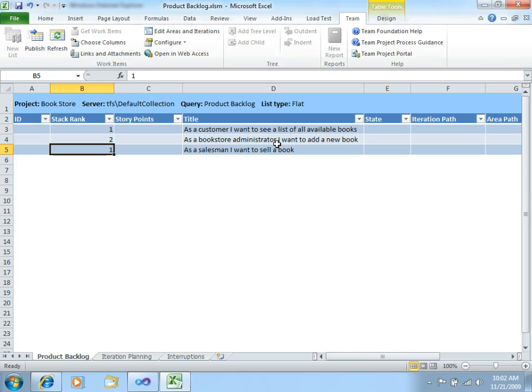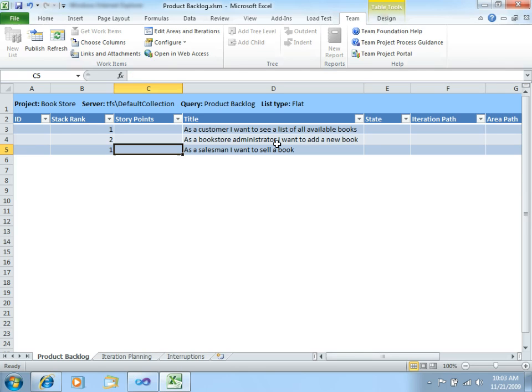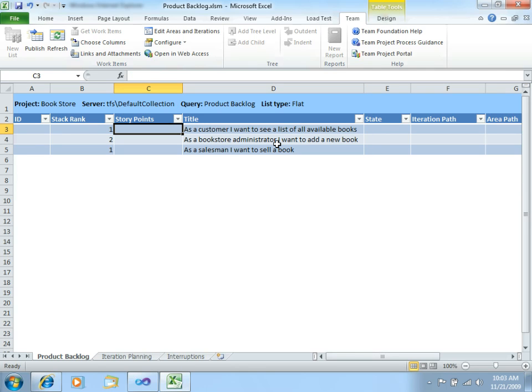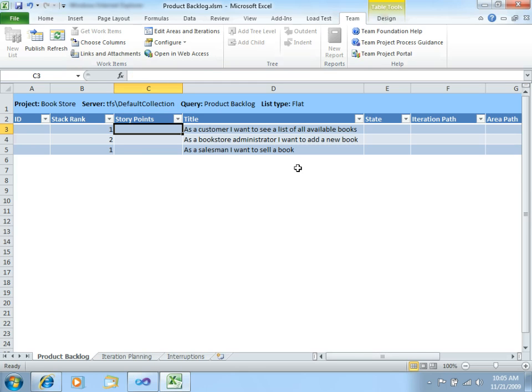Now, now that you have priorities, you should have some estimation for the size of your User Stories. This will help you on estimating how much work can be done in each product cycle, which we call sprints in the Scrum process. So, you will usually have sprints of two or at most three weeks when you have to deliver a new version of your product. So, how can you know how much work can be done in each sprint? You will use what we call story points, and story points is a measure of the amount of work or the amount of complexity in each user story.